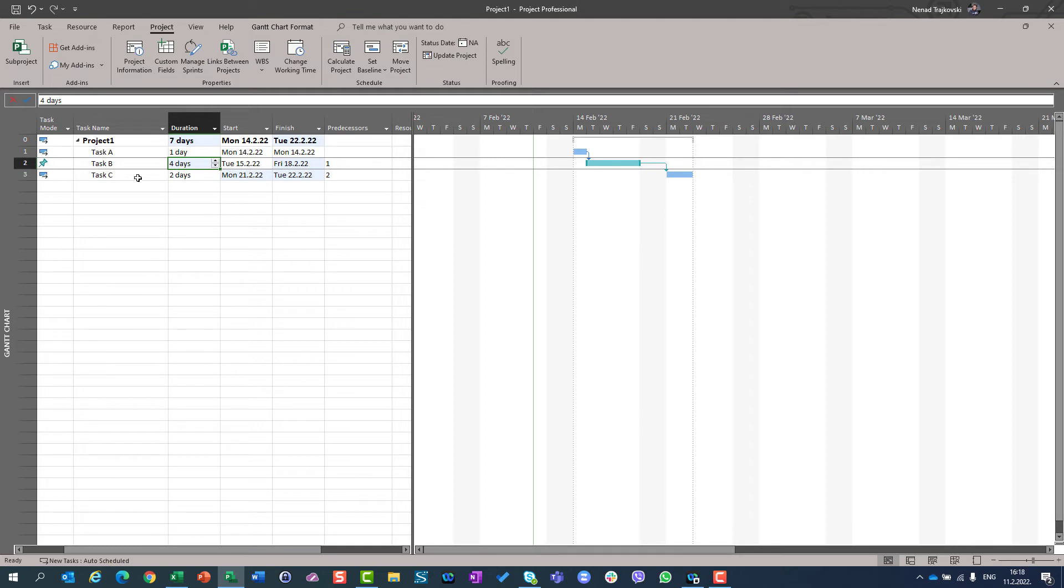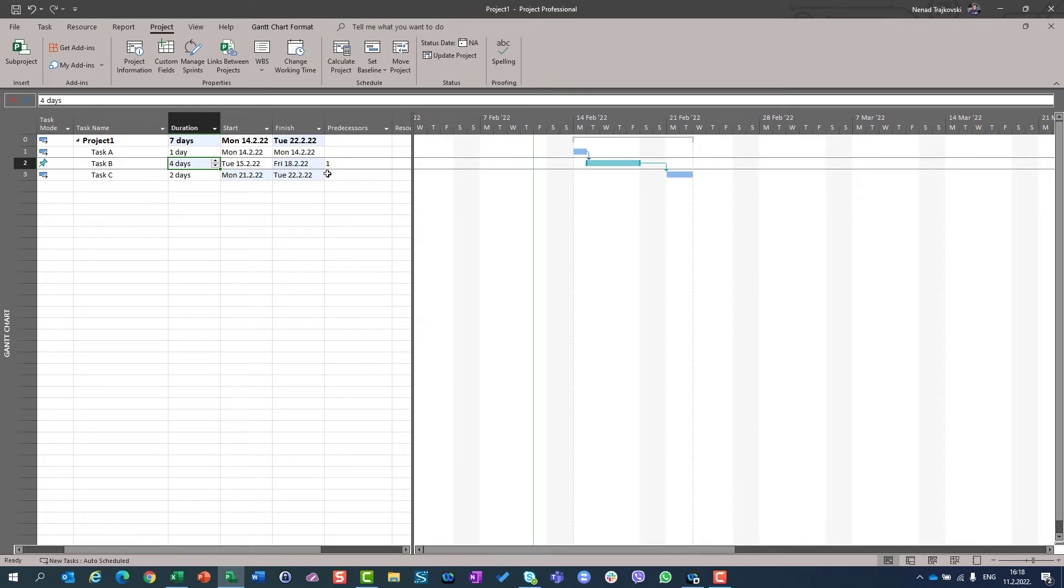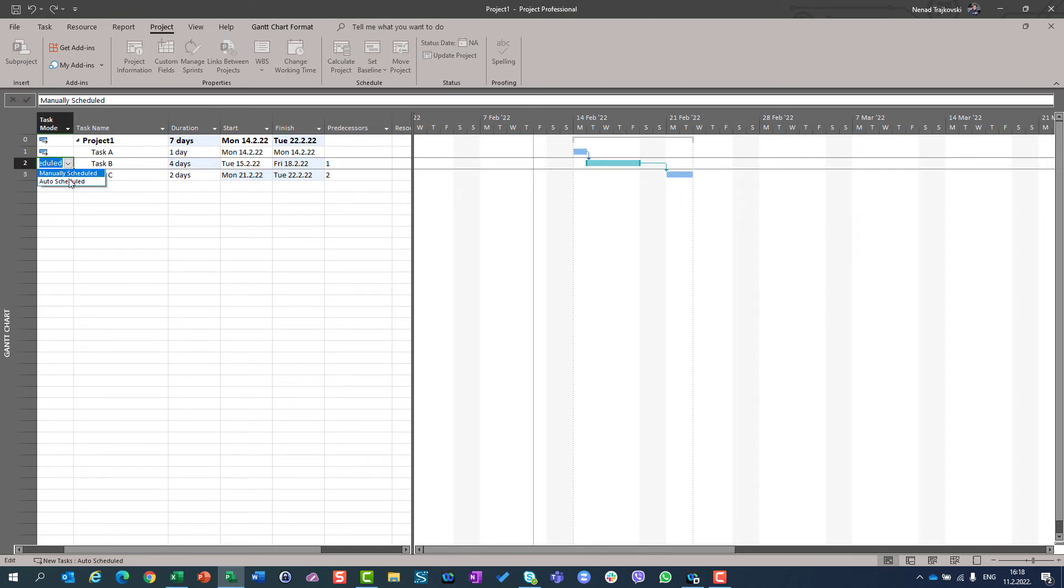How can I now? I know for task B that it will have four days duration. I know the exact start date, finish date, because I know that task B has a predecessor, which is task A, and a successor, which is task C. So now I'm ready to convert it, and I will go to convert manual scheduled tasks here. I will go here, and I will say it is now automatically scheduled tasks.